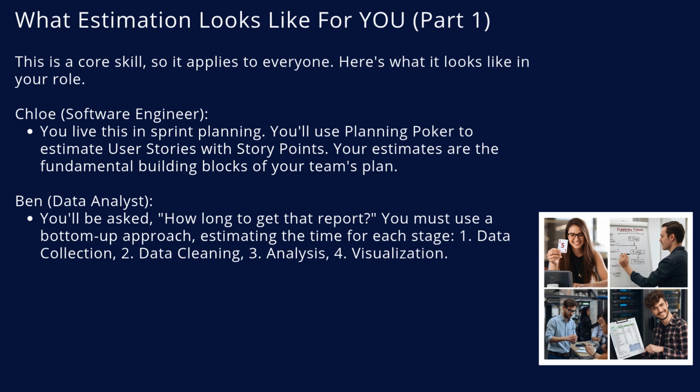For Ben, our data analyst, your manager will ask, how long until I can see that analysis? A junior analyst guesses. A professional analyst, like you, uses a bottom-up approach. You'll say, it will take 1 day to get and clean the data, and then 1 day for the analysis and visualization. I can have it for you in 2 days.